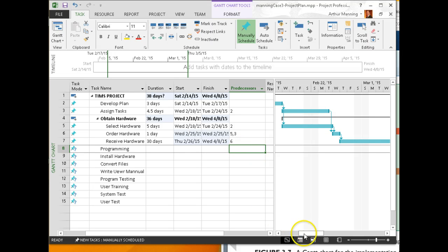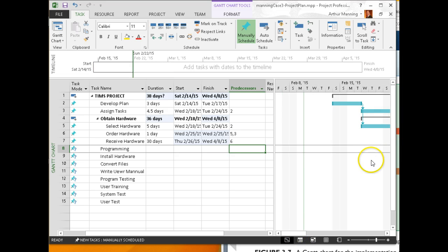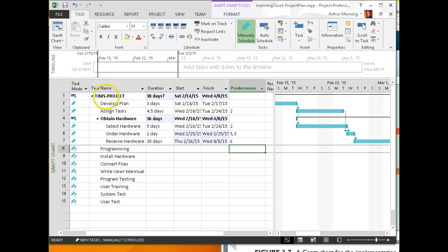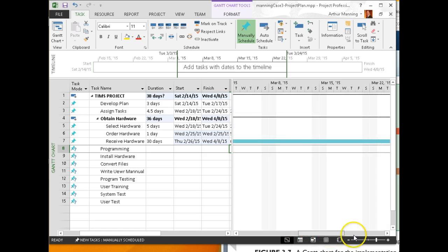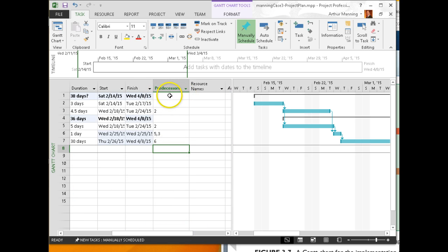In your typical project, you'll go top to bottom, the things that happen soonest. If you have multiple projects or multiple pieces happening at the same time, you may have a sub-project and then another sub-project that over here you might actually be seeing going in parallel. Notice anytime you make a task a sub-project to something else, you get this bar, a summary bar, for that task where you can't modify its duration. Its duration is determined by all its subtasks. So once you come over here, you notice this guy has no duration. This is calculated duration based on its subtasks.